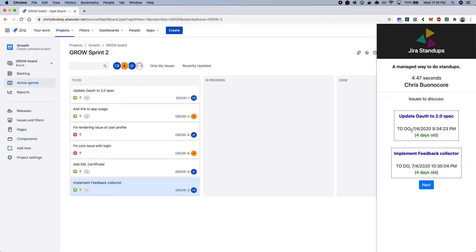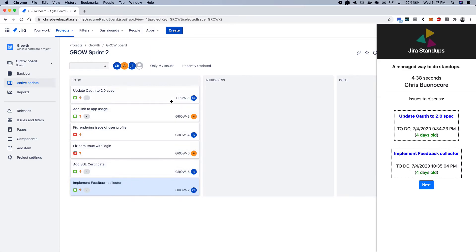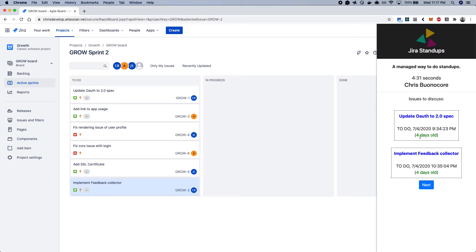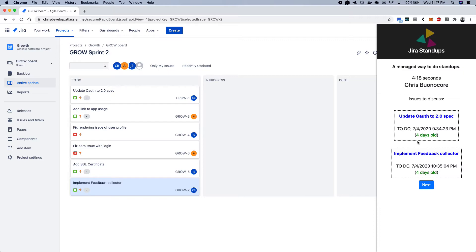So if I had a ticket on here that was created and stuck in development or to-do for a week or two weeks, it can be difficult in the current view to actually figure that out or extract that without digging into each individual ticket. So what this does is it finds and color codes based on the age, and a week or longer would actually show up as a different color. So now if tickets are going stale, you can actually bring those up to the group and really identify and figure out what's actually holding up the issue.